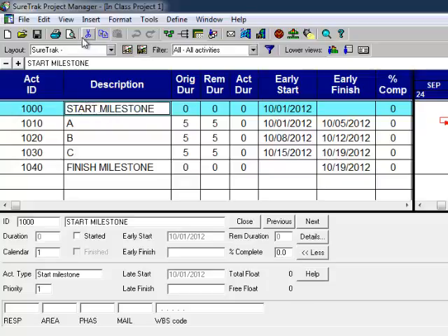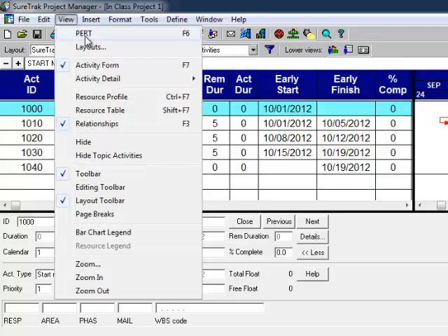Oh, one last comment. If you don't have the activity form open at the bottom, go to the View menu, and you see I've already selected Activity Form, the third item down. You must have the activity form open to update progress in SureTrak schedules. So with the activity form visible,